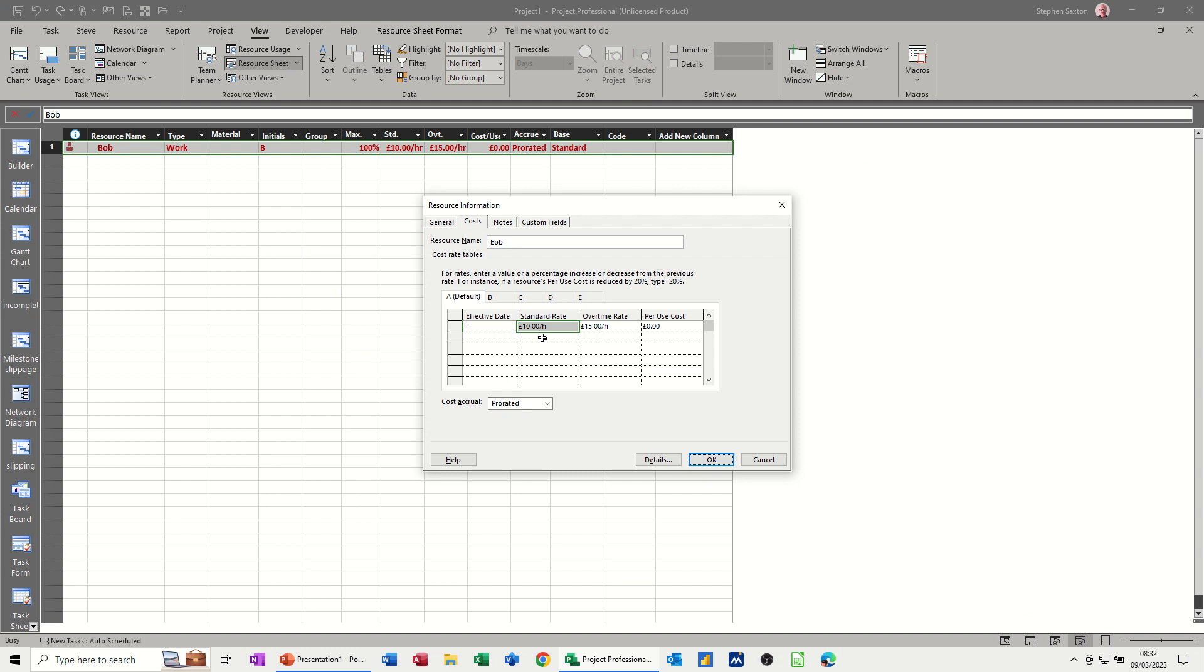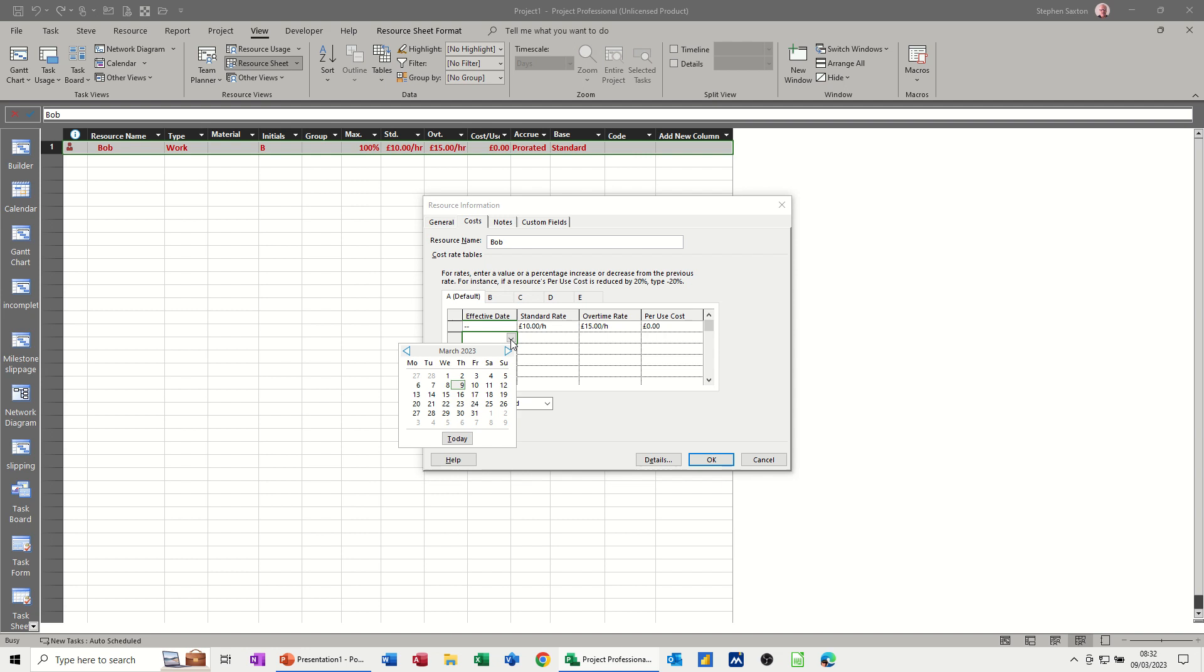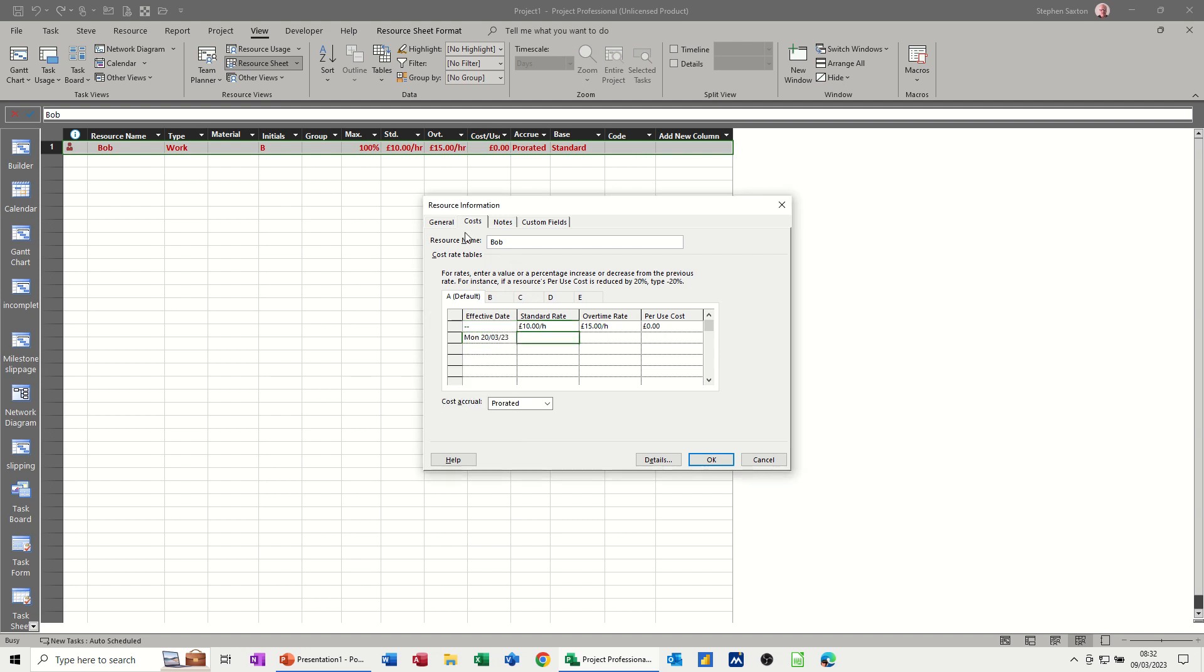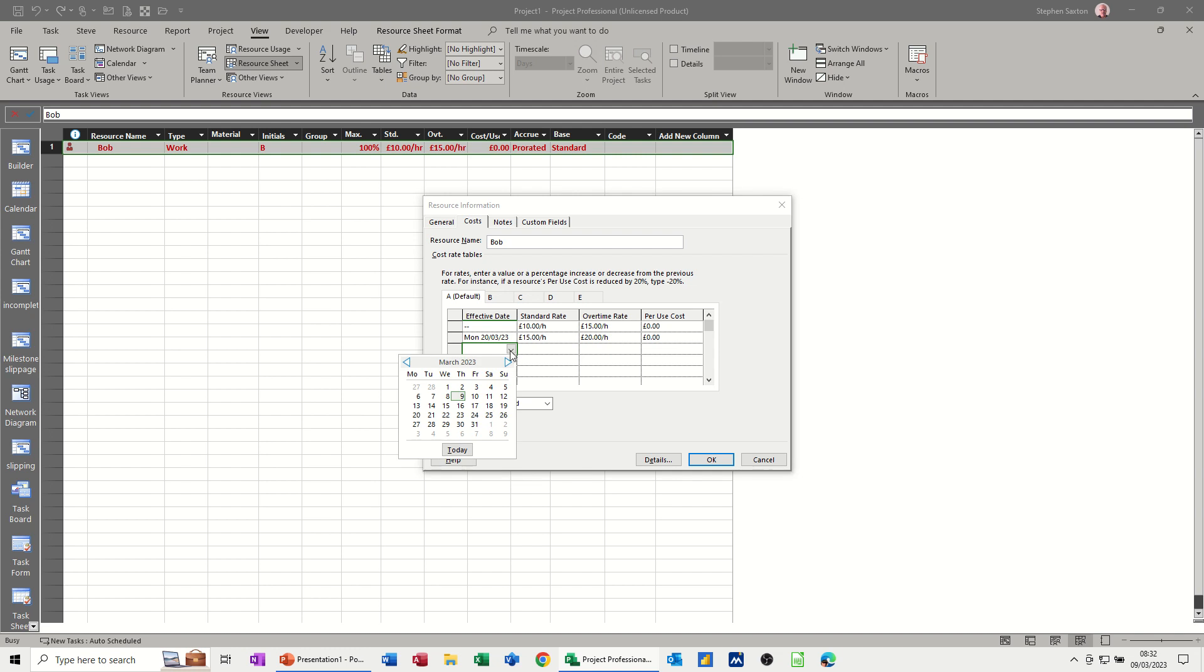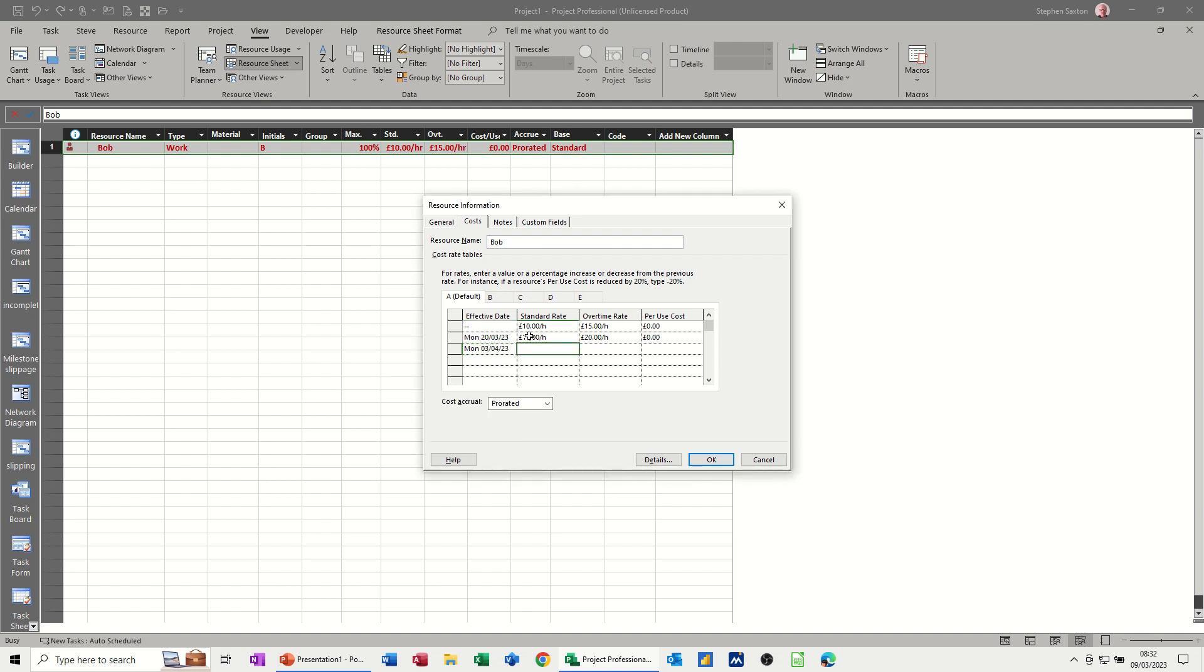So there's a default rate. Now, coming down, if I set a date, say next week, this guy is going to do work for a manager while the manager is on leave or away on some sort of long term contract. You might get a pay rise while you're doing that job. So I might just put that up for that period. And that might be just a few days, a few weeks or a few months. But if I just go and put it down for 3rd of April to the 3rd of April, then he comes back down to 10 and back down to 15.